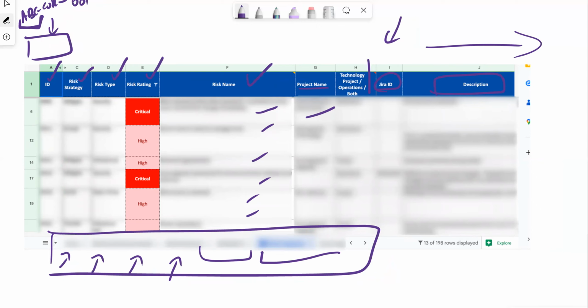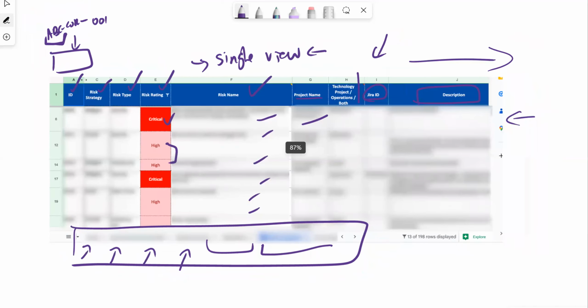So this risk register comes in different forms. There are description fields and requirements that give us an overview of how it typically looks. We want to identify that risk, analyze it, and give it a grading and prioritization based on severity. Then we want to document it in this form. Ultimately, this gives us our single view where anyone within the business can go in and look at what's critical, what we're working on, and what's not, and then we can have that risk process as part of our risk management cycle.